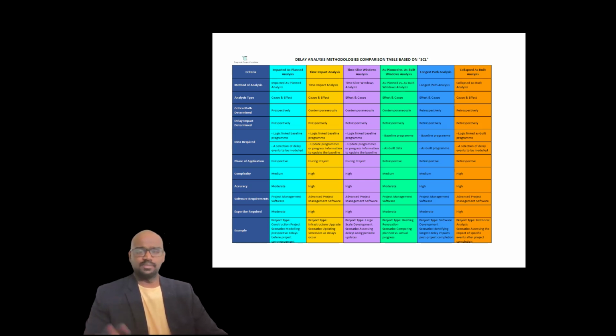So this analysis will be done 2 times, for the contractor and for the employer separately, and maybe for third-party delays or more separately. So you will remove the delays, and without contractor delays and force majeure delays, see what the employer delays could have impacted, and we repeat that for the other 2 also.